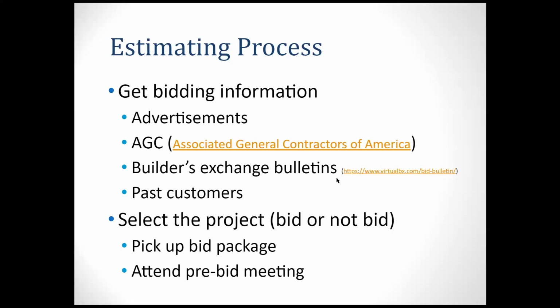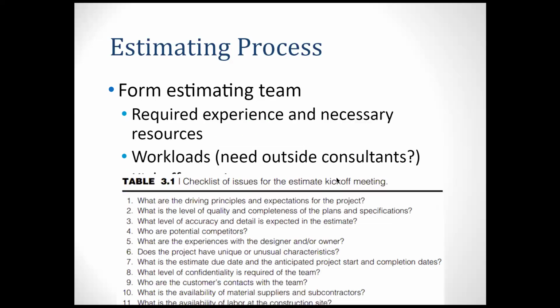So that means you need to decide either to bid or not to bid. If you decide to bid, then you will pick up the bid package, and also you are going to attend the pre-bidding meetings. For some of those, the pre-bidding meeting is not close to your headquarters, right? Then you need to travel. You will spend time and money as well. So in that case, you need to make sure how much chance you can win, and if awarded the project, how much chance you can make a profit, right? So you need to decide it, either bid or not bid.